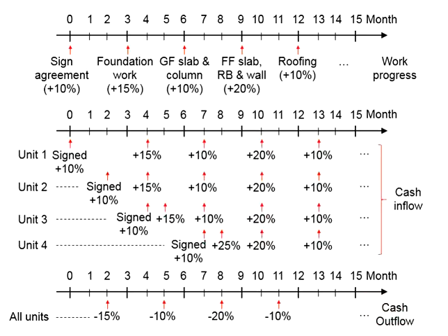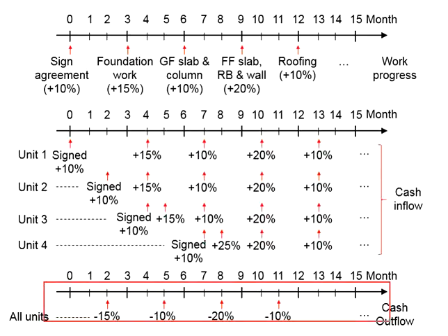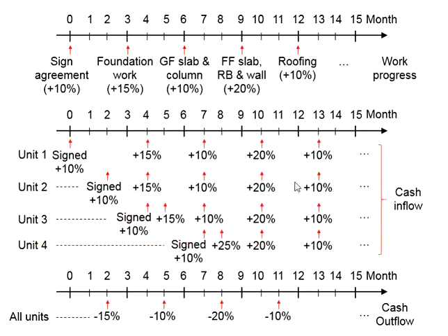Let's say we are talking about one single phase. Your expenses will be on the basis of all the units. Whereas your cash inflow may not be all the units. It is only associated to those units being sold. You would not receive any cash inflow for the units that are yet to be sold. Because of these reasons, most likely you will expect that there will be negative cash flow at the early stage of the development project because you are spending more than what you are receiving.